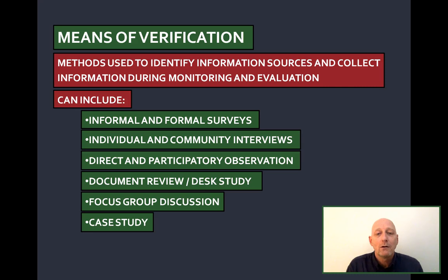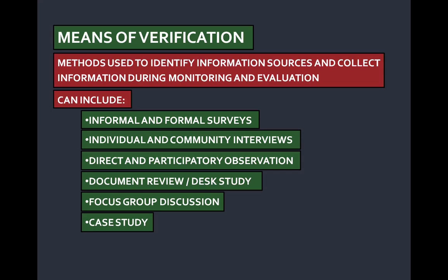And the tools that we can use are surveys, questionnaires and checklists, individual interviews with what we call key informants, key informant interviews, or interviews with the community, observation, physically inspecting and observing practices or availability, etc. Document review, desk study, using documents that are produced by other organizations or by the project itself, focus group discussion and community meetings, and the case study method.